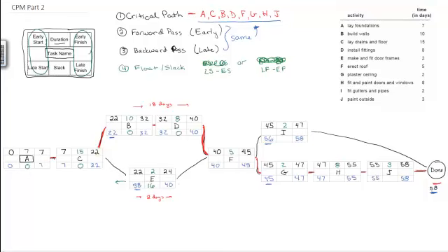I can do it right away. Or I can slide it more forward in time and start it a little bit closer to when I'm supposed to be ready for F. Okay? So I have kind of 16 days of movement in there with activity E. For F is 0, again, everything on the critical path is 0. I can't move these, otherwise I've delayed my project. But again, this I activity is a little bit mobile.